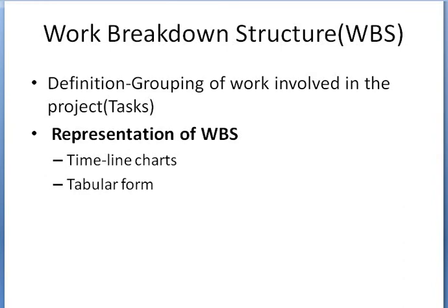This work breakdown structure is basically created after collecting the requirements and defining scope. So the project scope management plan, scope statement, requirements, and different environmental factors are the primary inputs for creating the work breakdown structure. It is created using decomposition techniques, which means the project is decomposed into manageable chunks.